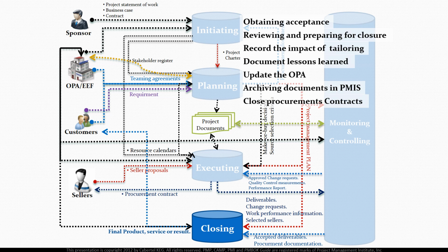One more important effort, done last in this process group, is to perform assessments of the project team. For example, how they performed and applied the project work. And we finish this group by releasing the project resources. This includes the project team and all other involved facilities.